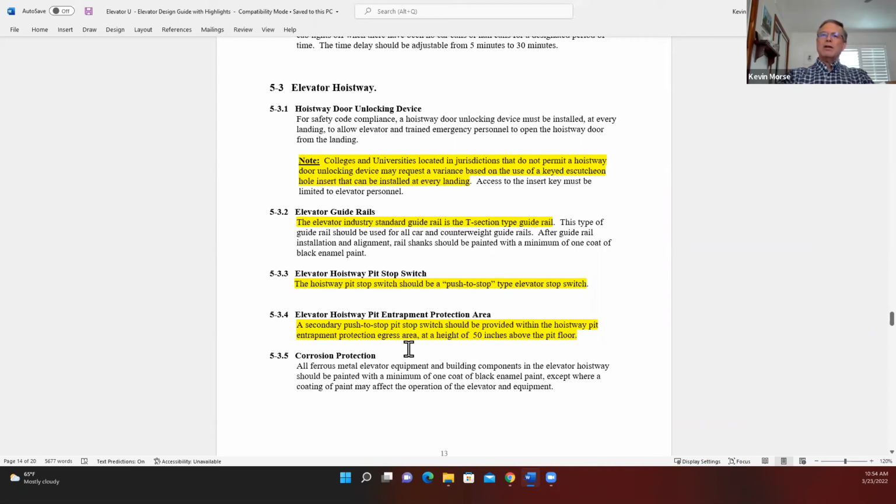One thing I want to mention is that for NAVFAC, we never allowed the inspectors to go out and do inspections by themselves. You should always be doing it with the contractor, preferably, or if you don't have the contractor, 2 people, because we get ourselves into tenuous positions and situations.